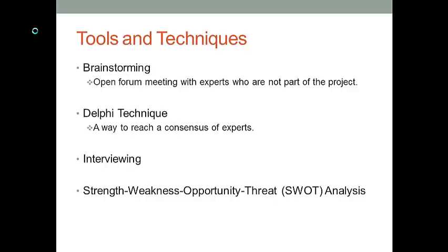Because they are experts from different fields, the experts may agree on some common risk factors, but they may disagree on some risk factors. So you want to keep the common risk factors they agreed on and organize another meeting with the experts to discuss the risk factors they disagreed on and why they have a different opinion about a risk factor.